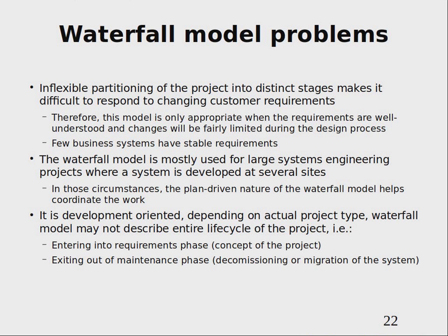But in larger projects, before the first stage of the waterfall model you have a preliminary stage just to get into the project, and then when the system is deployed, in any non-trivial large system you need to think about decommissioning this system or migrating it to a newer system.